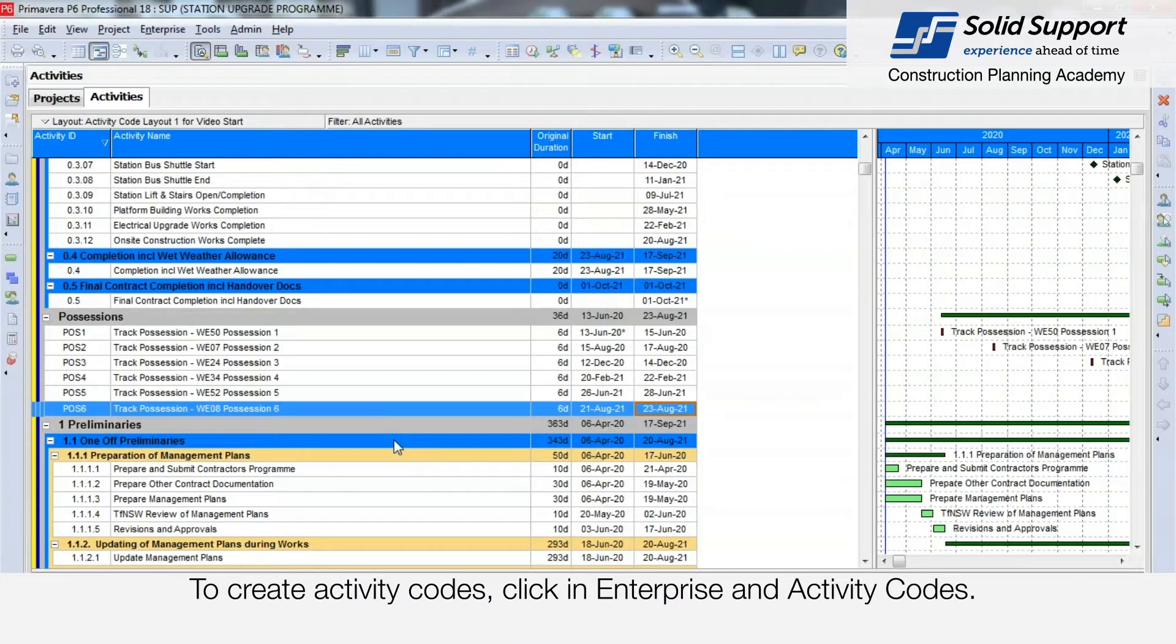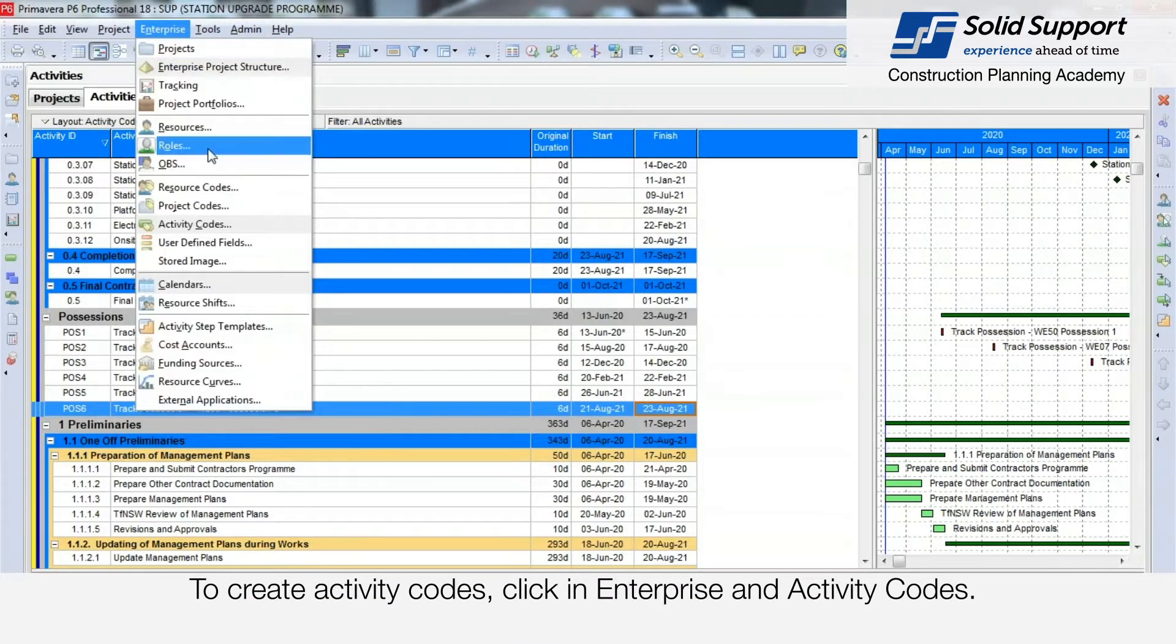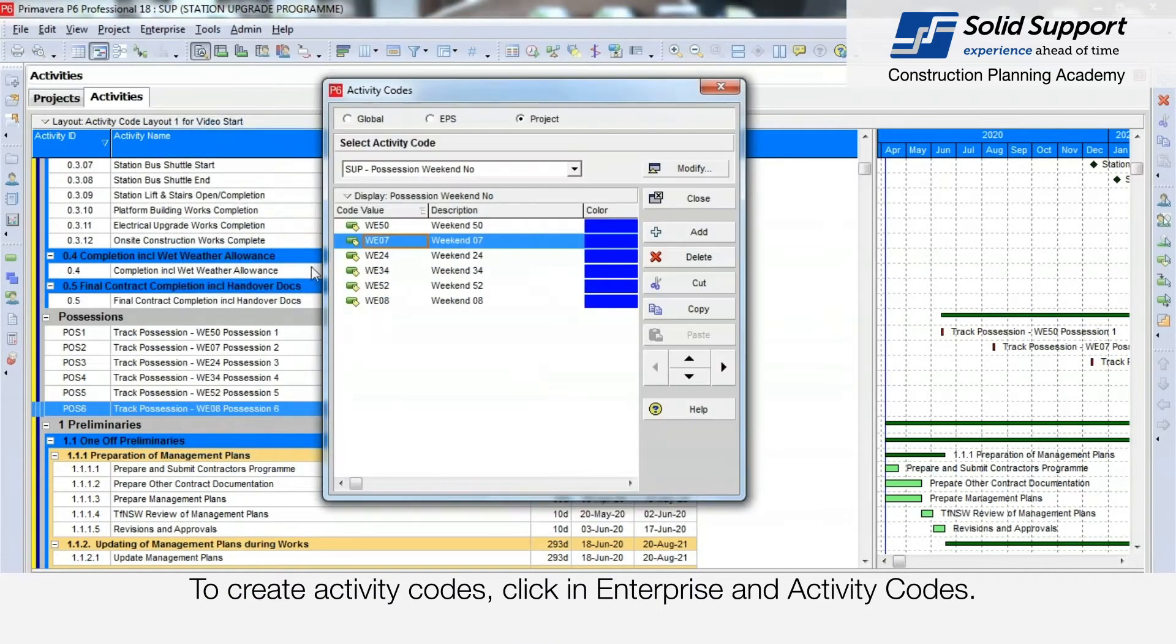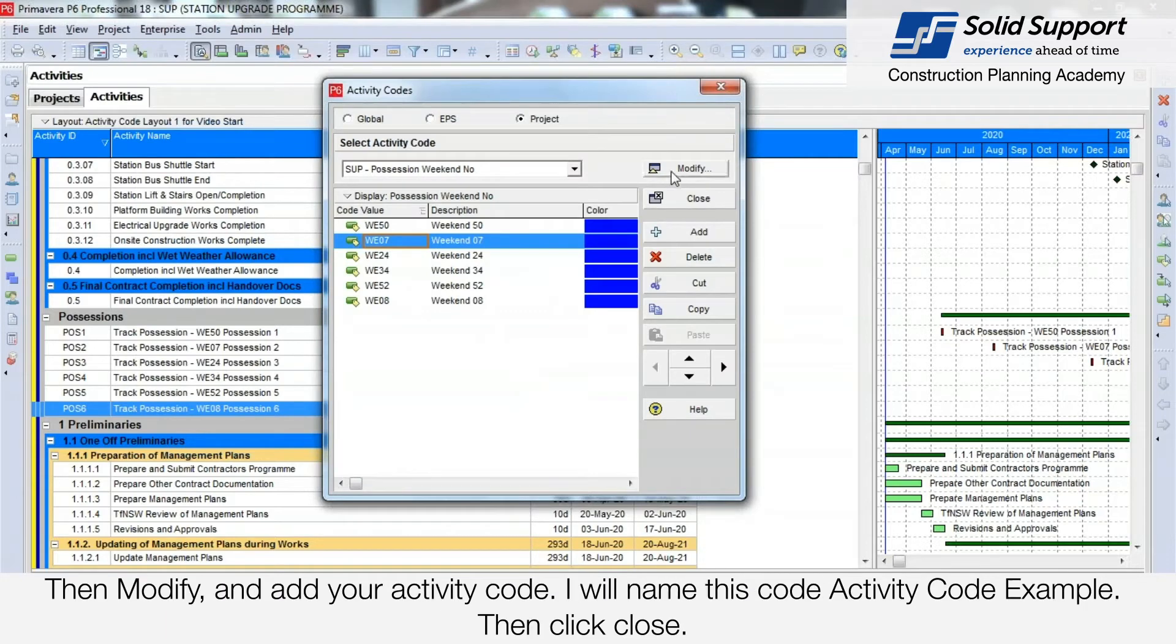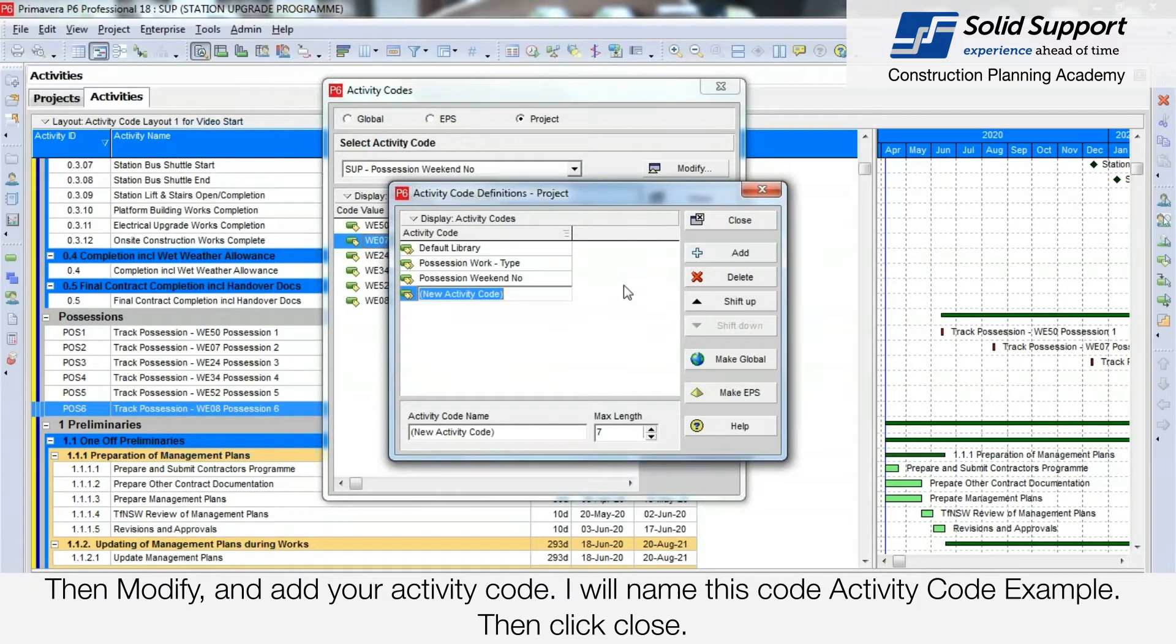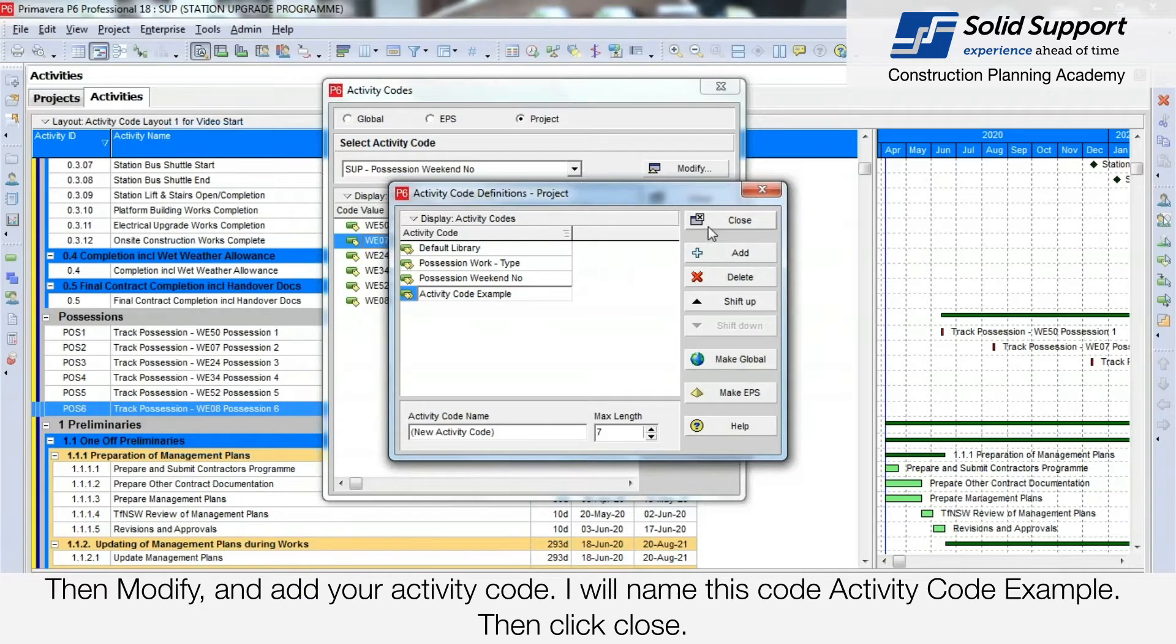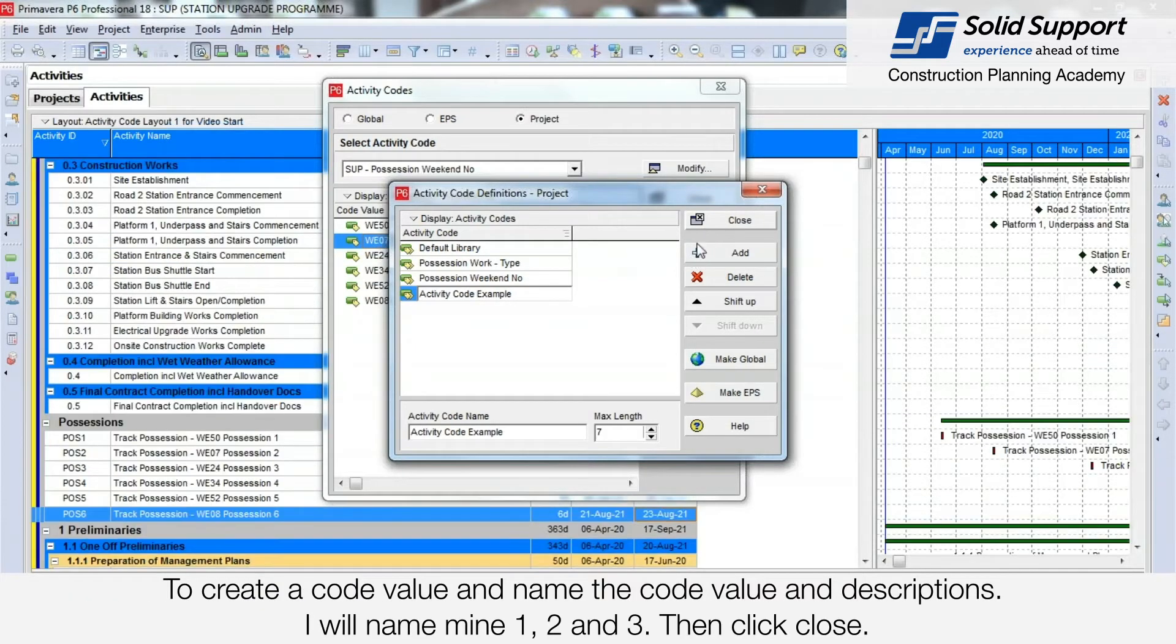To create an activity code, click Enterprise and Activity Codes. Then click Modify and add your activity code. I will name this Activity Code Example. Then click Close.